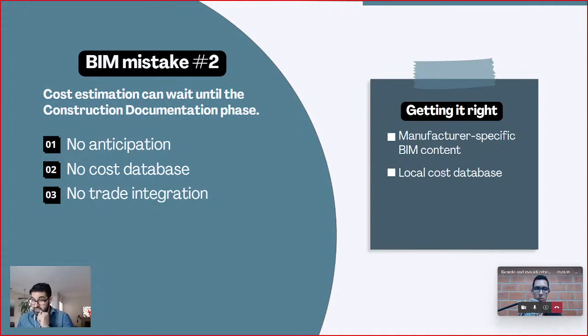The other thing which relates tightly to this point is knowing the local market. These prices have to work for the local client, not where you're at, but where the client is, obviously. And once you get these two elements right from the start, from the SD phase up till the DD and CD phase, you will have your cost always under control. Ricardo, do you want to add anything to this point?